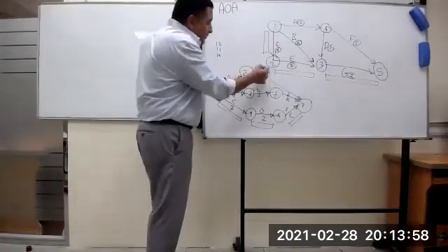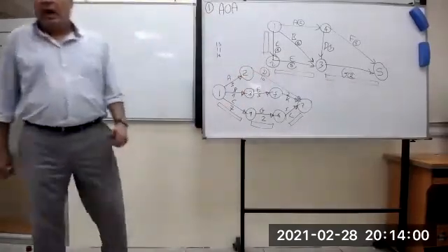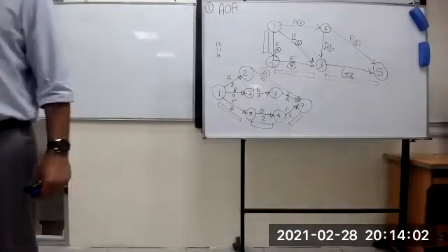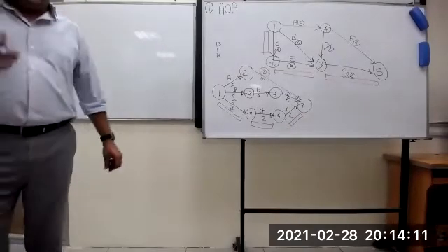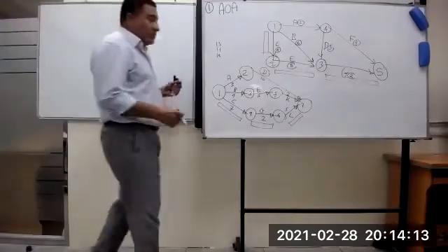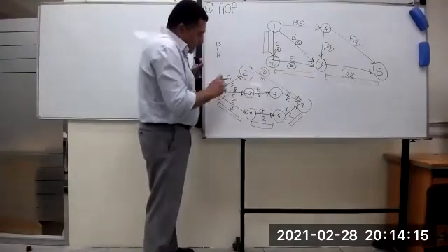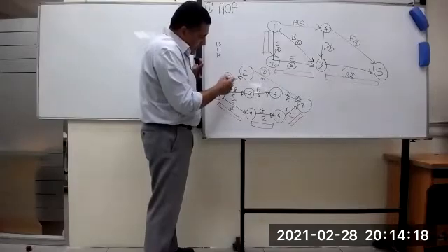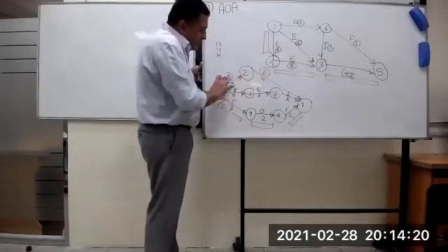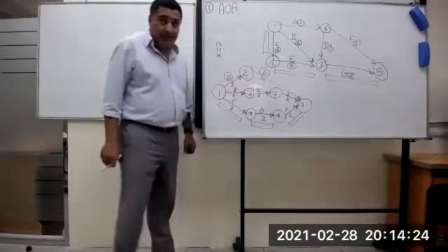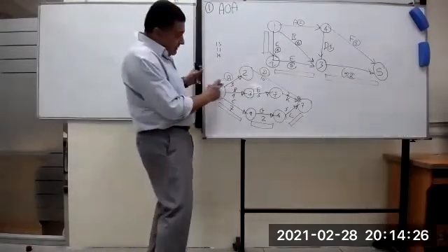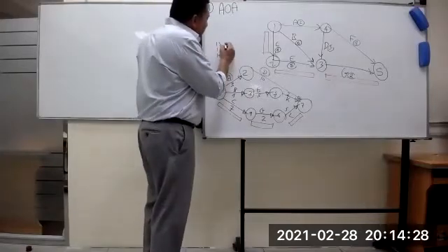Activity D has an early start. What does early start mean? For this activity E, how many total float? You can say float: 1. Because 13 versus 14, this is 1 day.